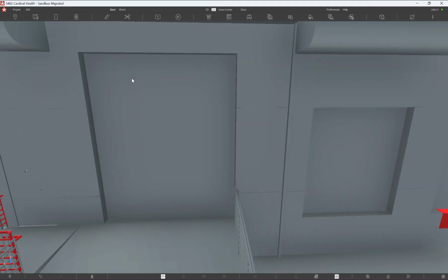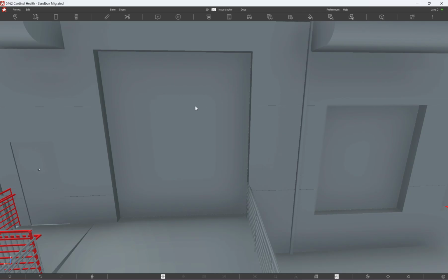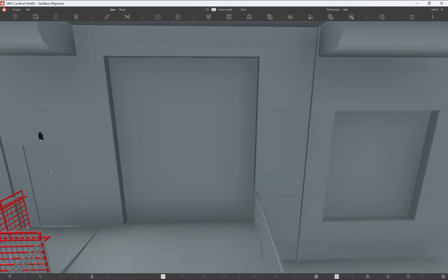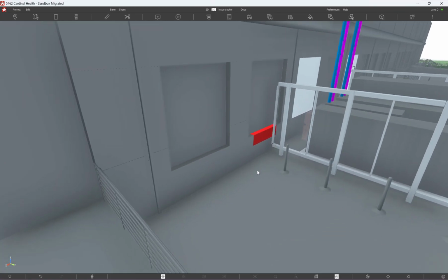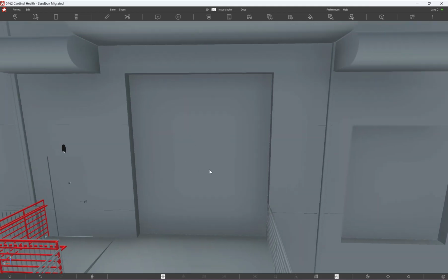And the reason I want to go back here to show you guys, so this is an actual example of how we used it. We had some guys coming onto site who were concerned about getting some of the equipment, some of the booms, lifts, skid steers, getting them into site through these roller doors. And we also had to end up using a dumpster behind these roller doors here. So we were taking the skid steer and dumping out some of the concrete we had from excavation. And so we need to be able to measure how tall these roller doors were, how tall this one was, so we can make sure we can get into site and get the materials off of the site. So I just talked about that example a little bit. Let's actually get into the tool here.